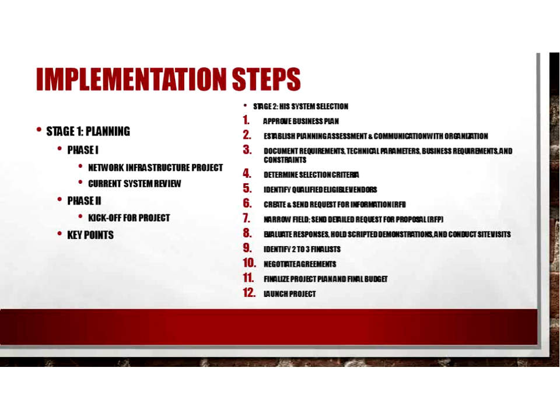Define the system requirements. This involves documentation of all your system requirements and forms, which is going to be the basis of the evaluation process. And these requirements are going to fall into 3 categories: your software features and functions, your technology requirements, and your business relationship requirements. These areas have to be discussed with the selection committee and others throughout your organization, as well as those vendors who are going to be competing for your business.